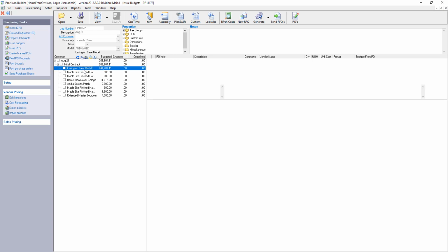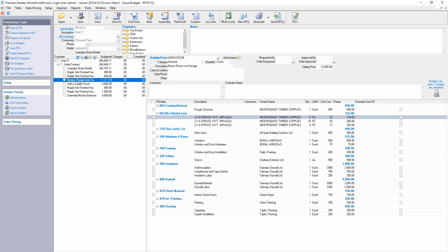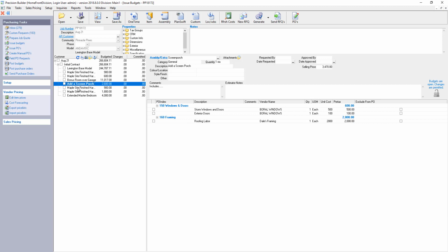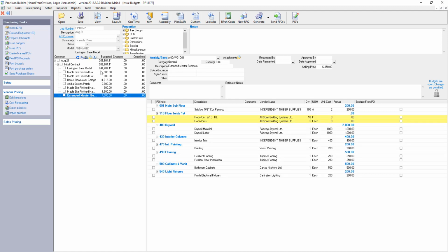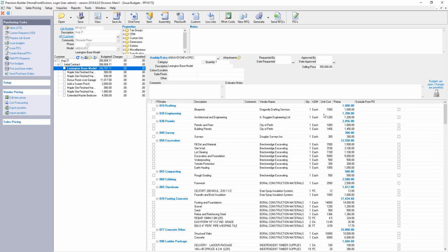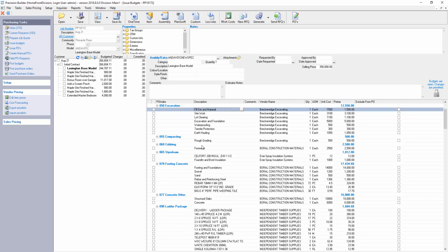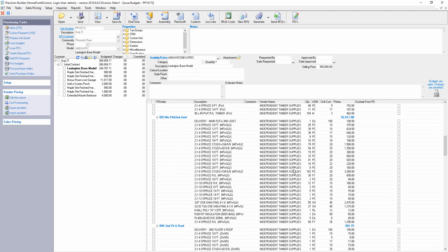The base model, the option to add the bonus room over the garage, adding that screen porch, adding the flooring by room location. All of those things are being added in there automatically for us, where all those details are being retrieved, where you have the opportunity to then review that information, make any adjustments to the necessary budget values, and generate that budget so that we can post that over into accounting.